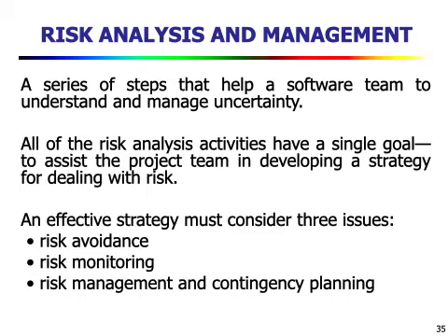And once this information is established, the risks are ranked by probability and impact, and finally a plan is developed to manage those risks with high probability and high impact. So the work product of this risk analysis and management is an RMMM plan, or risk mitigation, monitoring and management plan.